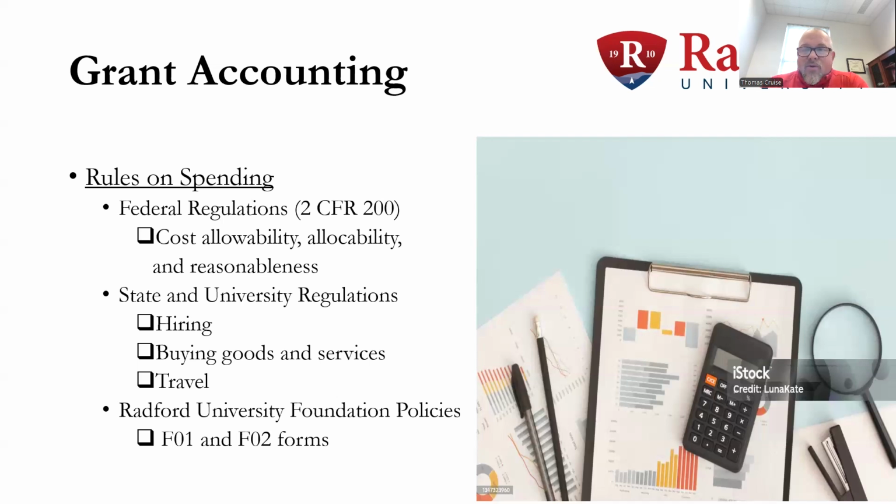So again, particularly with equipment, we want to make sure that if we're charging equipment to a grant, that equipment is being used 100% on the project. And if equipment is being used on other types of activities, including in the department, there might often be times where the grant can only pay for a certain amount of that equipment. Whatever cost the grant's not paying for is charged somewhere else. But those are just quick examples of that type of instance.